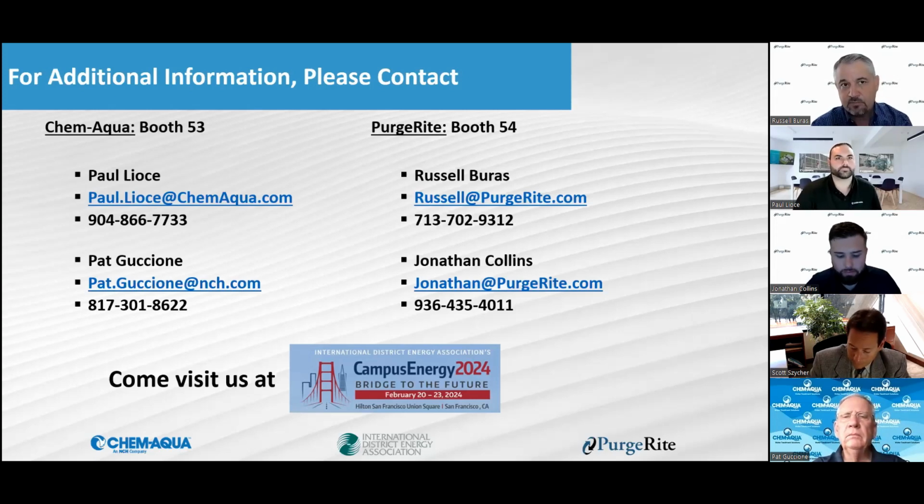And we do look at it based on how the system is designed. So the optimum place to connect in is sometimes to de-spool the pumps, because that's how the engineer designed the flow to work. And if that doesn't work, there are other options there. We have to look at the whole design, but that's typically how we look at it. So really it's getting those specifications and the drawings that allows us to put together our proposal. And our proposal is essentially based on equipment and time. It's not real complicated, and it's usually a flat rate price to the mechanical, so they know what the cost is going to be.